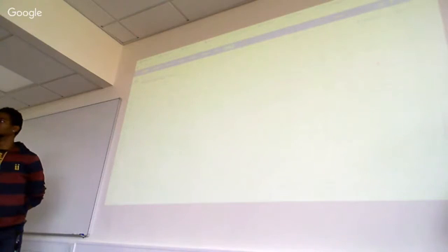The other thing that may happen, and that will happen, and that we need to think about, is that during your work, you find that there's something very important that you forgot about, and you want to do this in this round or this sprint. In that case, the recommended process is to discuss with the product owner. Because if you find something that you didn't estimate that needs to be done, then there is something else that needs to be pushed back in the backlog, because you can't do more than what you estimate. So if there's something new coming up, then you need to reduce the workload for the sprint by moving something out to the backlog. And you can't do that as a team without talking to the product owner.